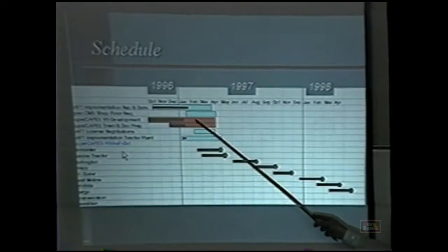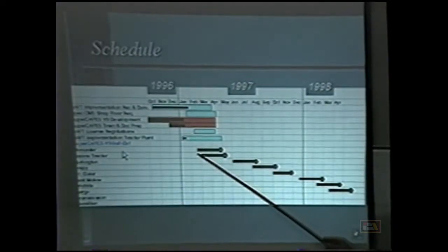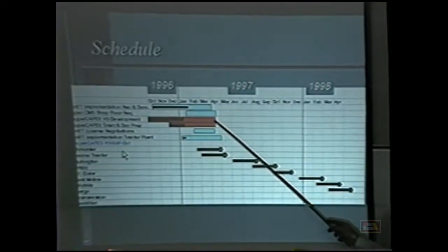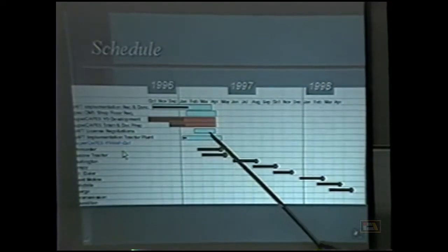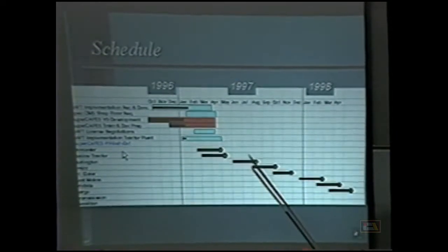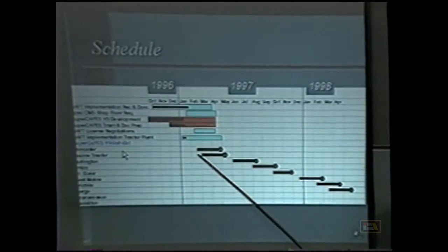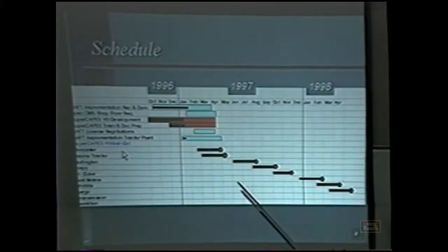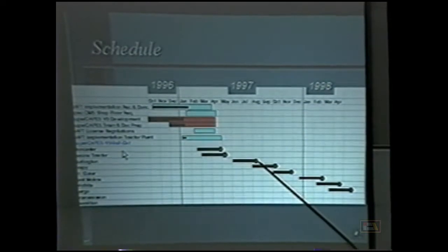The other reason we want to go to Burlington is they don't have any major product programs going on during this year. The next place is Saint-Dizier, and there they've got so much done in Raft that we'd like to just bring in the Super Capes product, and they're very anxious to use the assembly tools that Capes and the Line Balance have, because they have nothing. Then the next place we think we'd like to go is East Moline, followed by Wichita, Fargo, and we've got transmission in Hamilton at the bottom here, which is unscheduled.